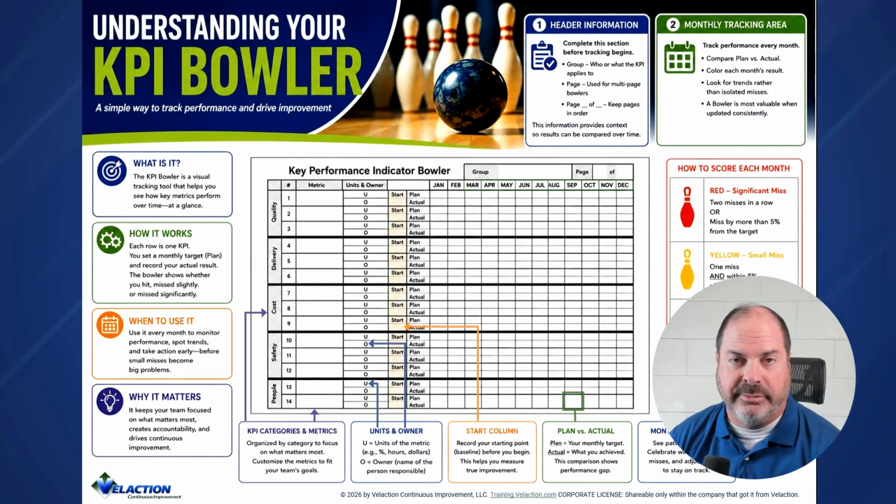It's not going to be that every month you get 1/12 of the progress. You may have a project scheduled in March and June, and then decide how you're going to approach the rest of the year. But the idea is you want to have a plan for what your targets are going to be, where you're going to focus your resources, and all that. So it should not be linear. If you see a linear progression here, that's very uncommon, because things don't just happen linearly in improvement.